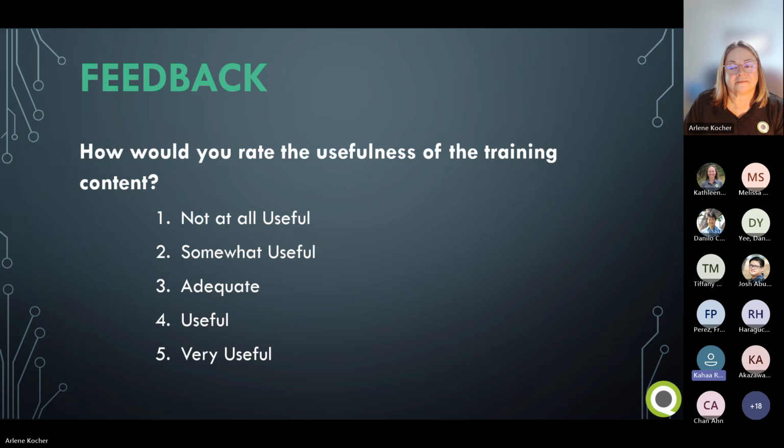I thought about our history of projects that couldn't be closed because we didn't have utility agreements. When Lisa and I dug into them, we found that in a lot of occasions DOT didn't follow certain steps, or maybe even follow up. There was no evidence in place to suggest DOT did their due diligence. So how are you going to go after the utilities? With that information in hand, the best way to address utility problems in the future is to get organized in-house, like you guys are.